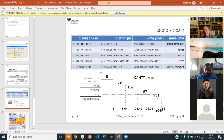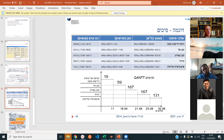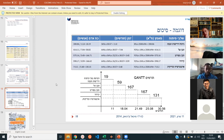This is how people are able to say a program is on schedule or a month behind schedule — because they have this plan. You could argue with this, and what's nice is that you have numbers and can show the method of how you got there. We could be wrong — it's like predicting the economy. I can show you what statistical methods I used, but the prediction is only as good as the input data. Was it really 150,000 lines of code? Was my EAF really 1.7? Garbage in, garbage out.